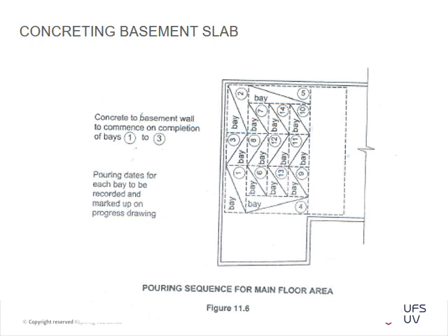Okay, then they just went into more detail of actually construction bays. So they've got certain blocks that they do their pours in, because you can't pour a continuous block. Remember that site visit to Sarge where we had the construction joints and the saw cut joints for the expansion and movement of your concrete. That's basically why you have to plan boxing in your concrete pours within the specified parameters from the contract or engineer. Okay.